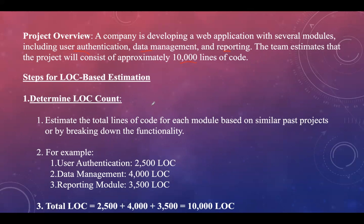We break down the code for each module based on similar past projects or by breaking down the functionality. For user authentication, assume 2,500 LOC; for data management, 4,000 LOC; and for the reporting module, 3,500 LOC. The total comes to approximately 10,000 LOC, estimating that the entire project requires 10,000 lines of code.